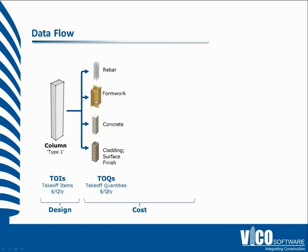For a column, you have to erect the rebar, erect the formwork, pour the concrete, and put on whatever the cladding is. Inside of our system, that's non-graphical data. It's really best represented by the combination of the cost plan and the scheduling plan, but it's designed to be connected to the model. What the model can give you is very accurate information about the number of columns and their properties — for example, the surface area, vertical surface area for formwork and cladding, and volume for the concrete.